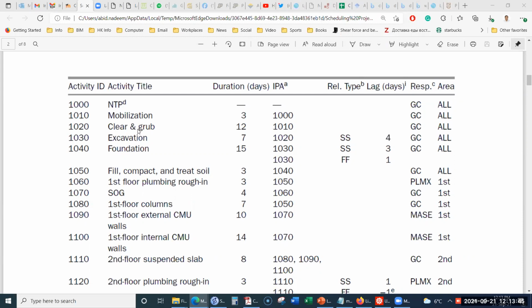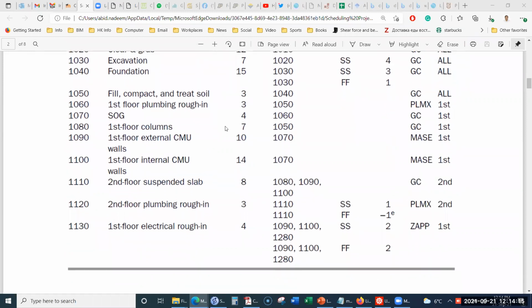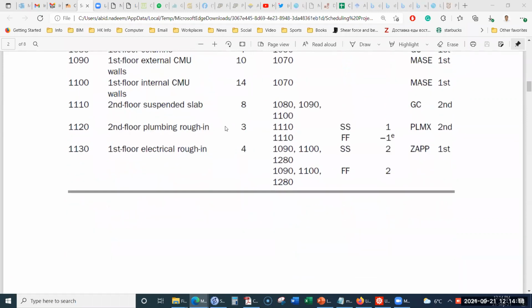At the minimum, you should have the information about the activity name or description, the duration of that activity, and immediately preceding activities. And of course, maybe relationship type and lags, etc. So some minimum amount of information, if it is available, only then can you schedule the project. So all this information has been provided to you in this case.